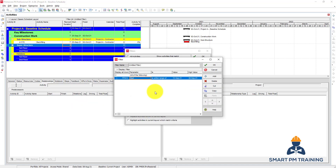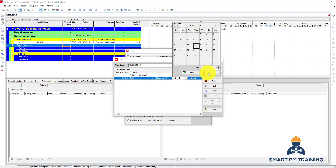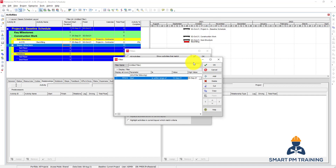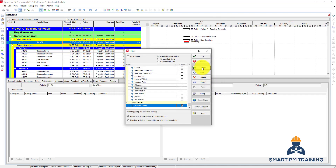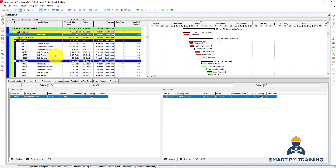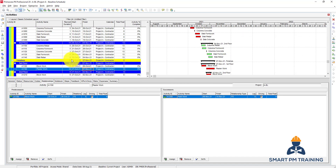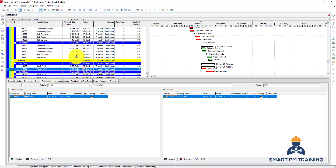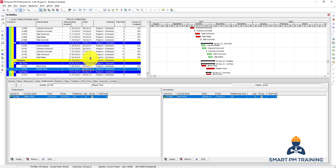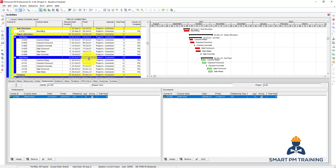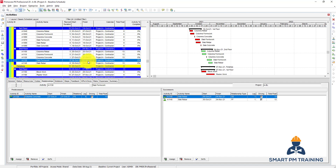There are many more filter options available. Let's widen the range from 15th of September up to end of October. Now I have more activities inside the filter. I want to add another filter condition — these activities are too many, and most of them start and finish in October with a few in November. So I want to filter for activities that start in October but finish in November.